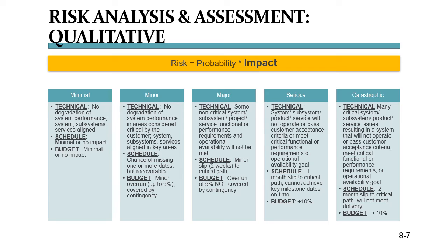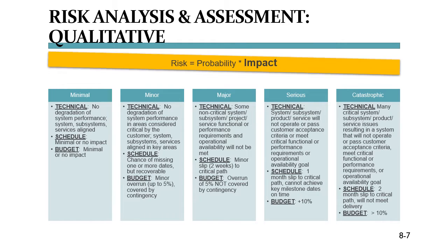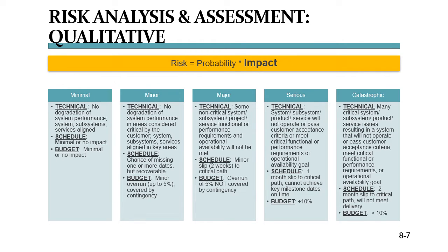We just said that each risk is the result of probability multiplied by impact or consequence. And we have defined the categories for probability. So our next step is to define the categories for impact and consequence. I keep saying impact or consequence because both words are used in organizations and they both tend to describe pretty much the same thing.